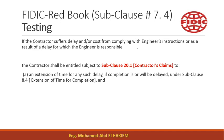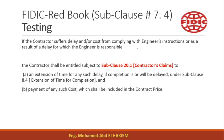A. An extension of time for any such delay, if completion is or will be delayed, under subclause 8.4 – Extension of Time for Completion; and B. Payment of any such cost, which shall be included in the contract price.